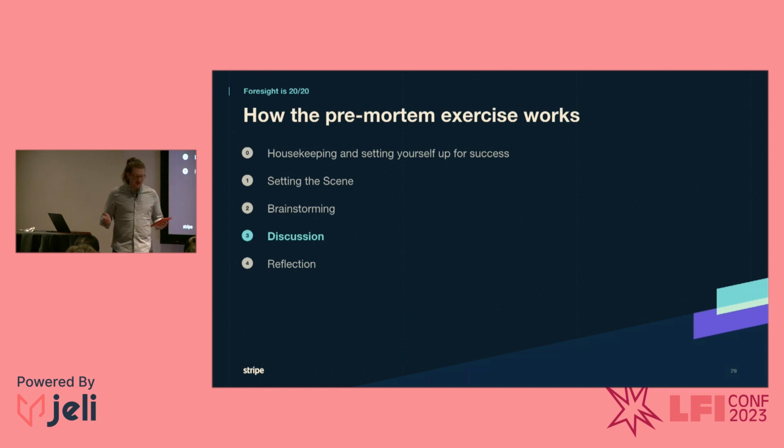So after about 15 minutes, the discussion facilitator will move us into the third step, which is kind of the meatiest portion of the exercise. It's the discussion, and this will take probably the latter 45 minutes of your exercise. We'll run through all of our brainstorm ideas and talk about how we would triage and resolve each in an incident scenario.